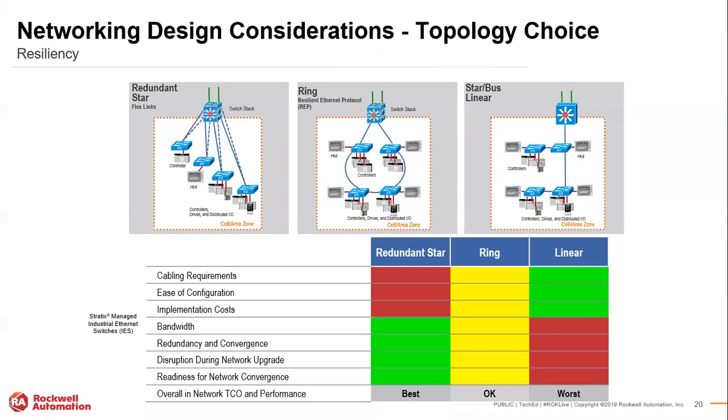Think of this drawing, this might be a little difficult for the people on the phone. If I go through the switch and the two switches on the bottom are not put together at the same time, and I do the ones on the left and the right, that ring doesn't close. I can only see these. So if this grows and I have 10 panels to deal with and 3 of them in the middle are not terminated at the same time, or I don't have power, I can't commission those back to the main network, because all of a sudden I can survive one break, but I can't survive 2. If I lose this one cable on the left-hand side, I'm perfectly okay. But as soon as I lose another cable, I only see what's tying back into my top-end infrastructure. So you just have to mitigate that when you're doing commissioning. Outside of that, once it's installed and configured, it makes things a lot easier.